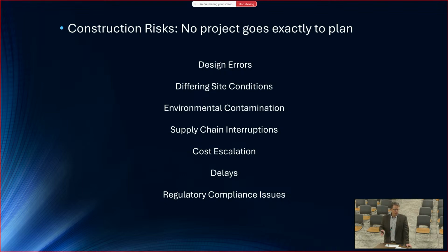And then as you read through the contract, the risk of differing site conditions was on the city. On behalf of the city, we were trying to negotiate with the contractor, saying, well, look, we're paying you all this money to go out there and investigate the site before you start digging. If you miss something and all of a sudden you're surprised by the pipe that we didn't know was there, shouldn't that be on you?